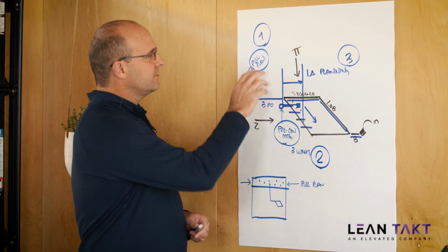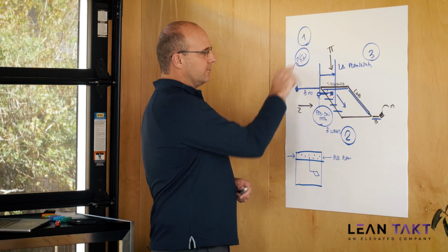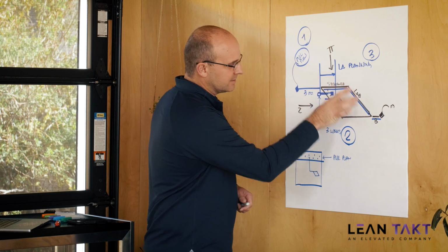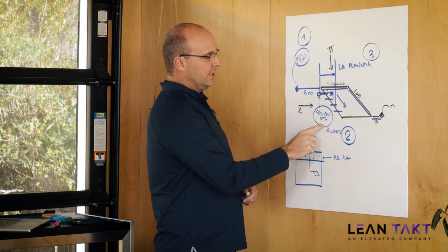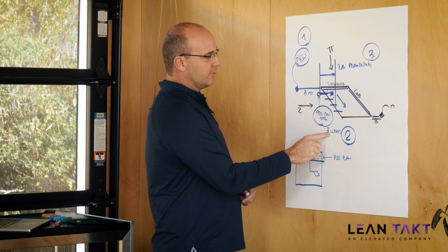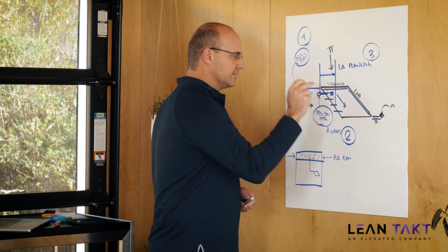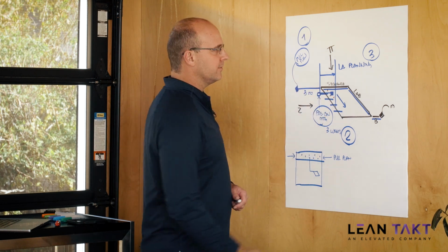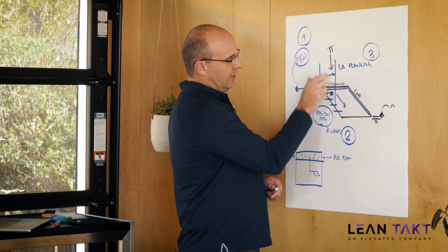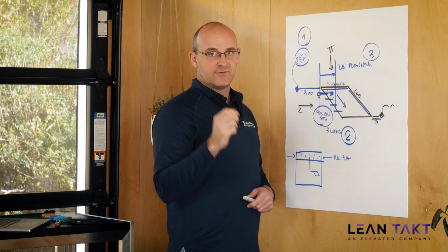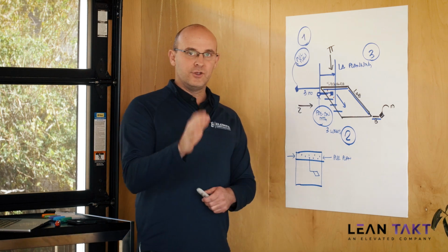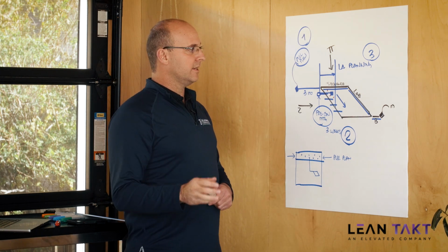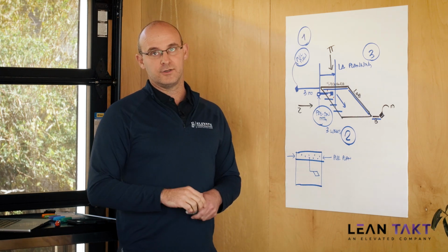So if you have these 3 habits, your pull plan, which makes sure you have the right sequence, line of balance, and overall plan. Number 2, your pre-con meeting, where 3 weeks ahead you plan for the wagons themselves and queue up the trade partner properly. And then look ahead planning, where you're always looking out 6 weeks ahead for roadblocks and the alignment of materials and other resources. Then you will be in the habit of queuing up work properly on your project site.